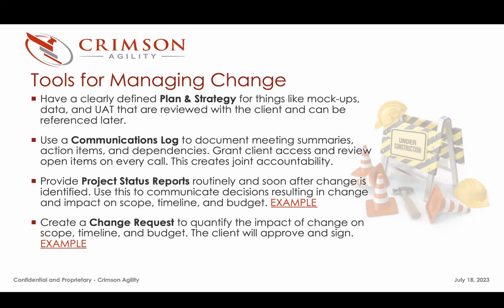Yeah, if you approach it early enough, right? So you have a 10-hour task and let's say the developer is 2 or 3 hours into it and realizes this is a lot more complicated than we thought. We need to recalibrate. That's when you're going to have the most credibility, and you can be matter of fact. Hey, we're going to recalibrate the estimate. We think it's going to require another 5 hours. We'll eat the 3 hours if you don't want to do it anymore, right? But it is what it is.